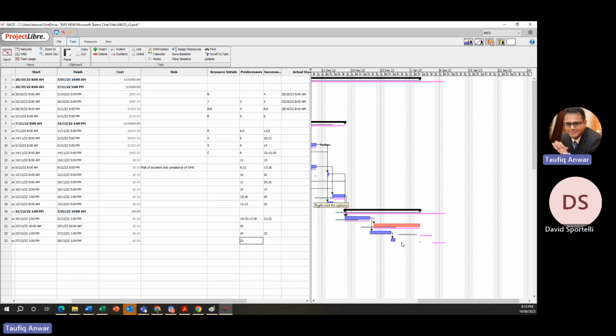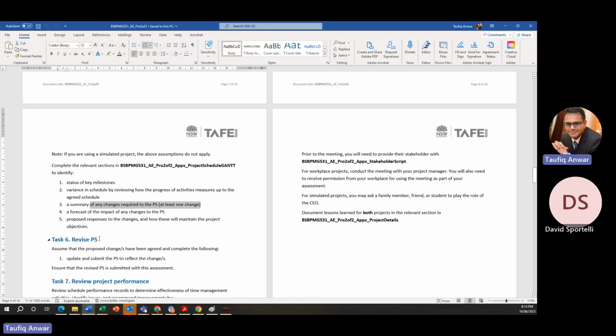What will happen in that case? Probably you had this tolerance. For instance, your project was supposed to be finished by this time, and now you are either finishing earlier. This is the baseline, the first baseline, the ash color thing. So now by doing this in parallel, you can actually finish even before the first initial baseline. Make sense? So that is probably one of the takes on how you're trying to fix it.